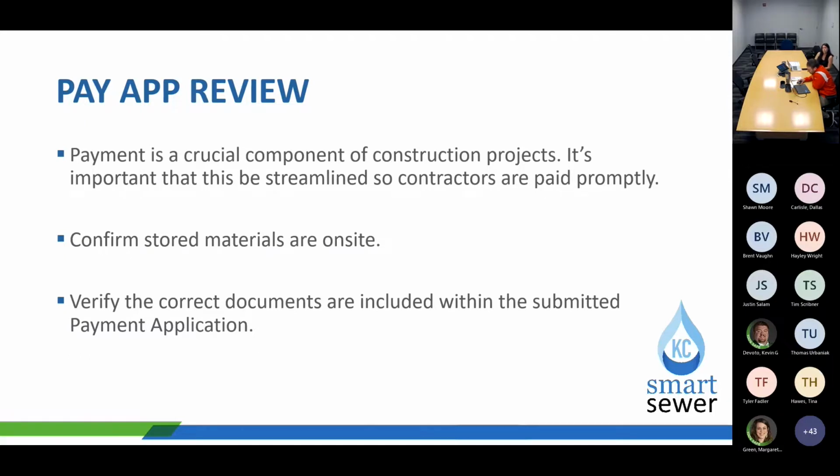Within the monthly pay application, there are some documents that will be included in the process, and these are the pay app cover sheet itself, the approved schedule of values, the contractor's compliance audit reports, and the monthly approved schedule and narrative.